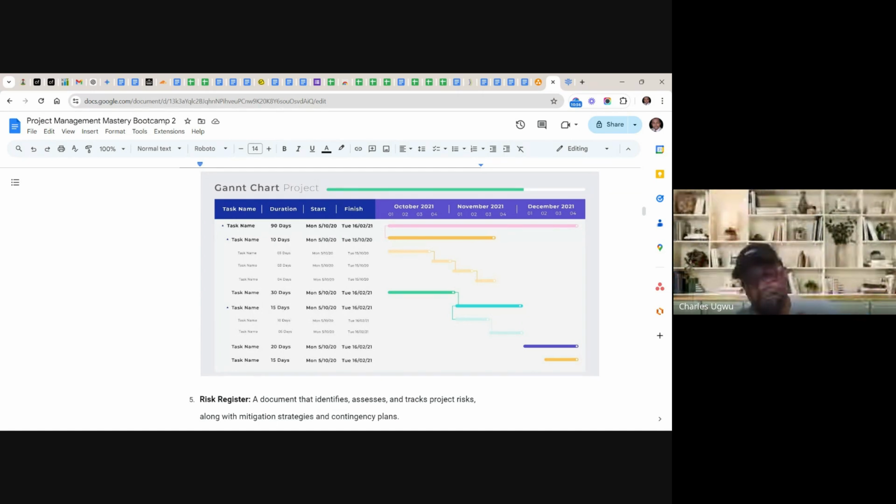Good. After 10 days, if you do not achieve this, that is a big risk for you because you are not going to start the second task if you do not finish this. These are some of the things we are going to understand, and we are coming to that: critical path analysis, critical path areas. So you need to understand these are where the risk lies.